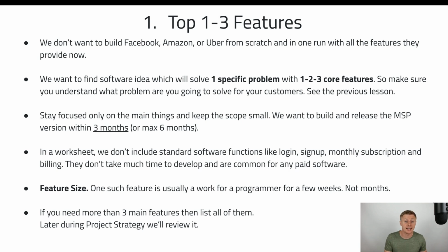One of our previous clients sent us 10 pages of scope document where each row described one feature that took us anything between 1 and 4 weeks to develop. Do you imagine how much work it was? One row, 1 to 4 weeks of development for one full-time developer. In that case, with that project, it was fine. This project was about business optimization software for an existing hotel. We spent about 2 years with a team of 4 people developing it, and the project price went a bit over $500,000. But you don't want to end up with 100 big and significant features.